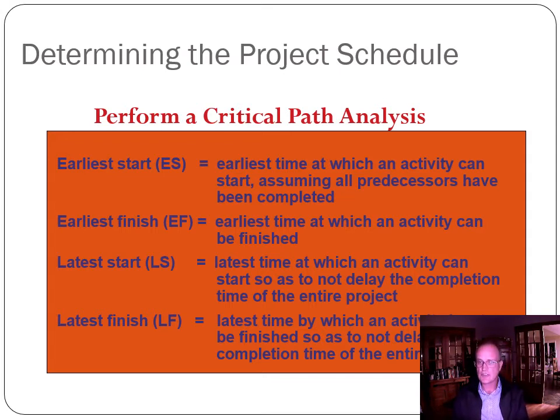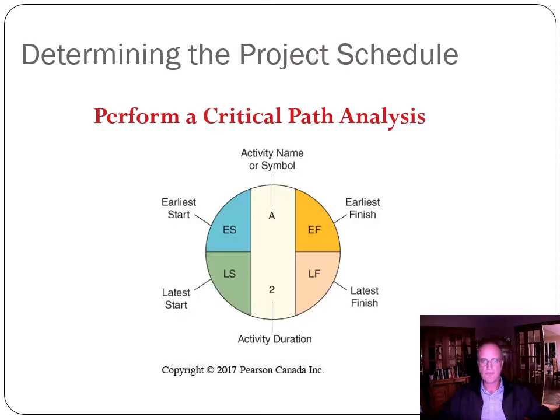And the latest finish time is the latest time that an activity can finish so as not to delay the entire project. And again, the difference between the latest start and the latest finish is the duration of that individual activity. And so this becomes a little clearer when we work through an example.